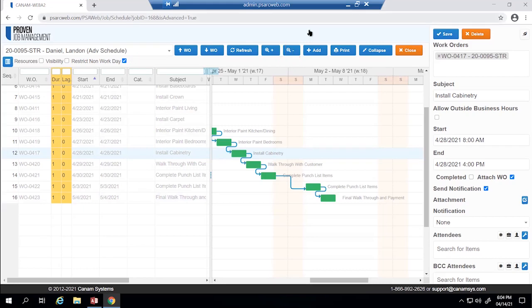An example for this intended use is if you are scheduling a work order on a Friday with a duration of 4 days. The software will automatically push that out to a 6-day duration because it is considering those 2 weekend days.